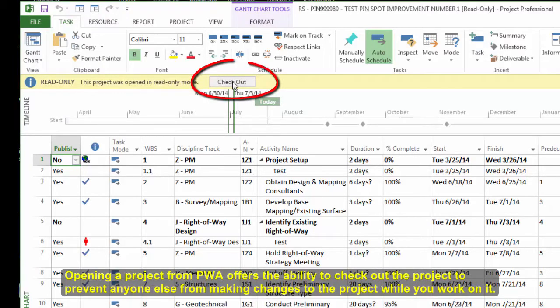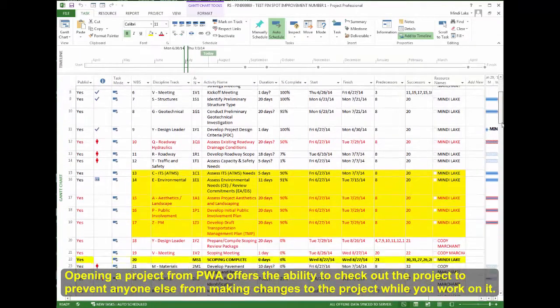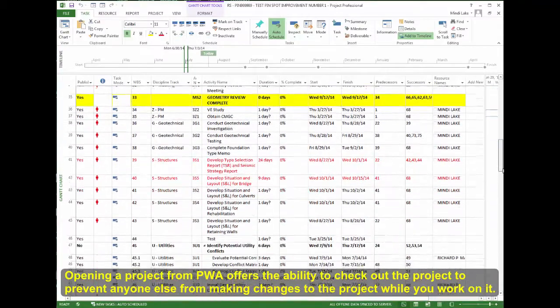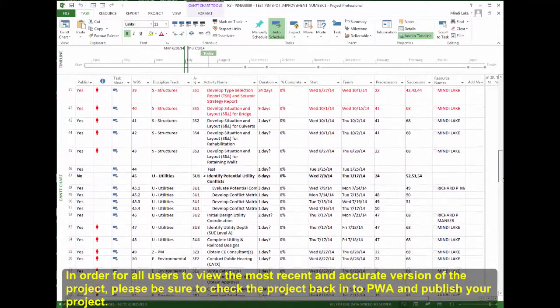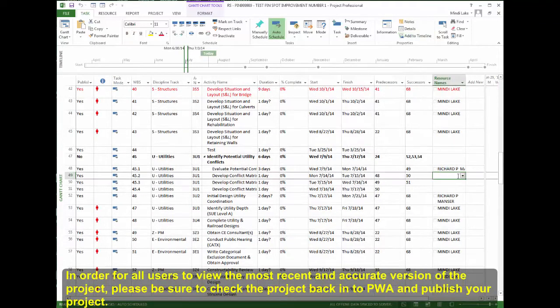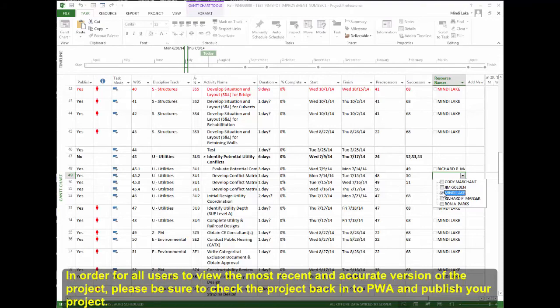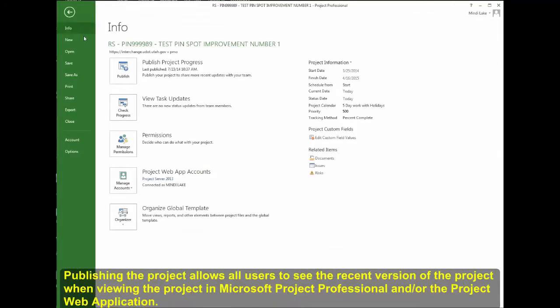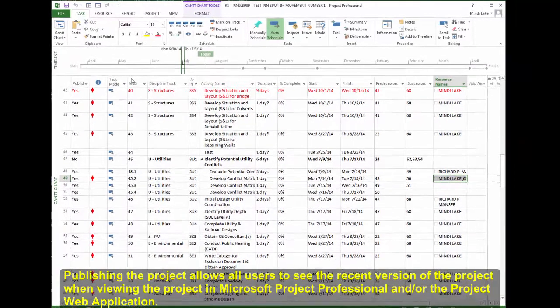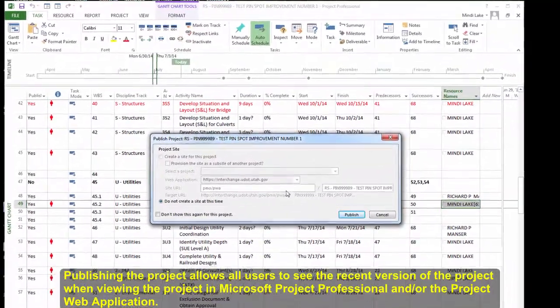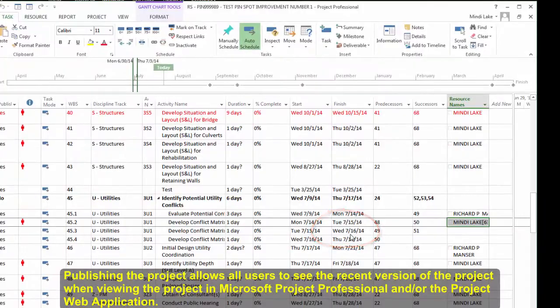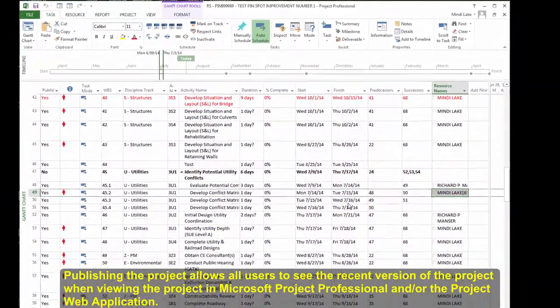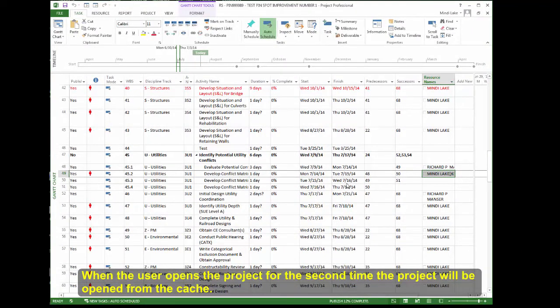Opening a project from PWA offers the ability to check out the project to prevent anyone else from making changes to the project while you work on it. In order for all users to view the most recent and accurate version of the project, please be sure to check the project back into PWA and publish your project. Publishing the project allows all users to see the recent version of the project when viewing the project in Microsoft Project Professional or the Project Web Application. When the user opens the project for the second time, the project will be opened from the cache.